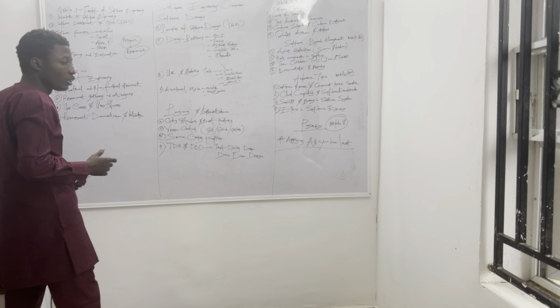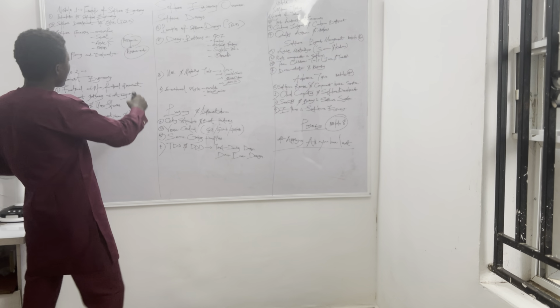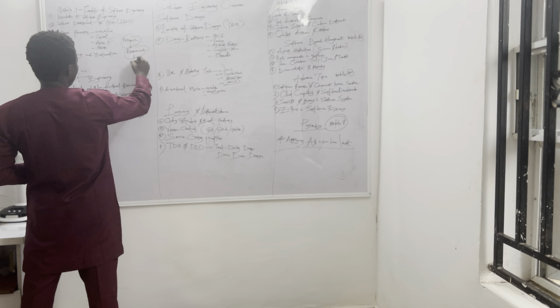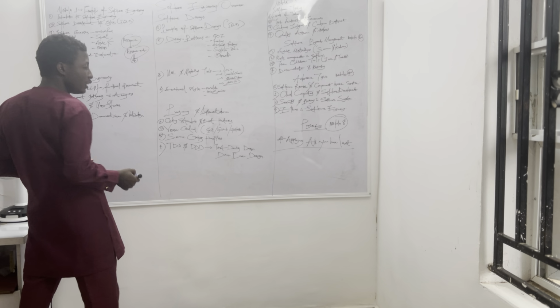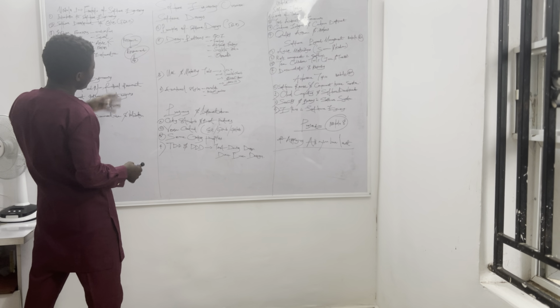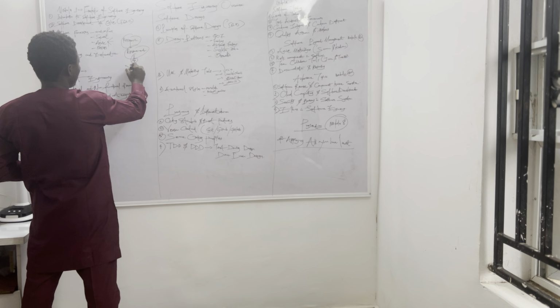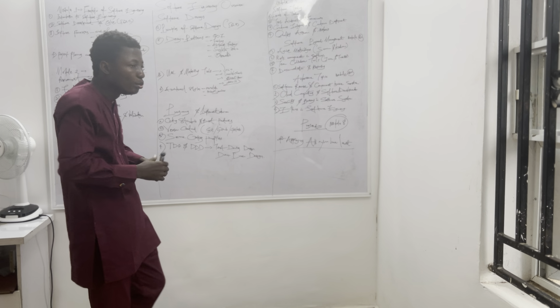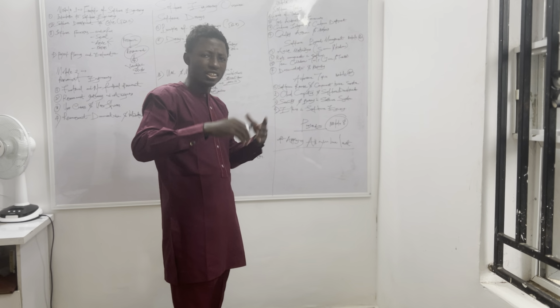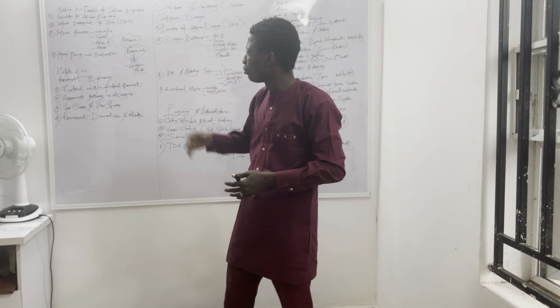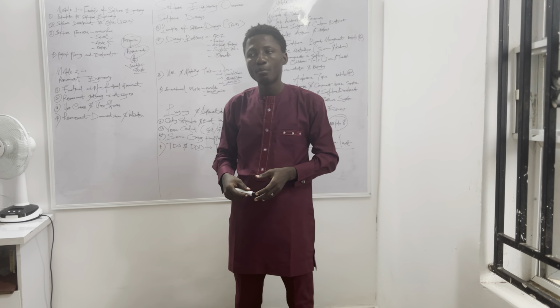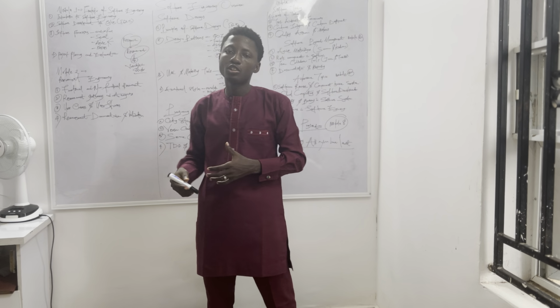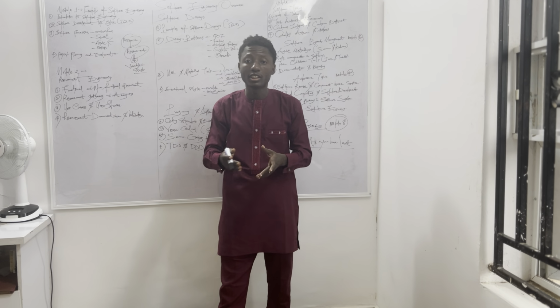After you understand the requirements, then you map out the feasibility. You're still going to be doing something like a feasibility study. A feasibility study is where you see whether what you want to build is really worth it or not. Then after all that, you look at what resources you have available: how many engineers you have, or how many people can get on the project and start it.